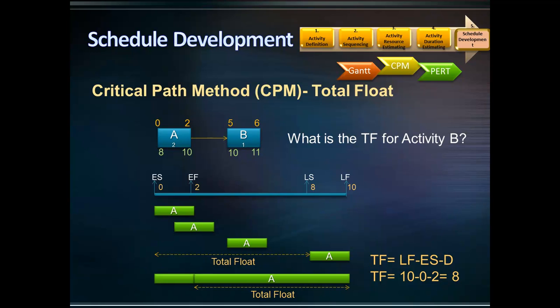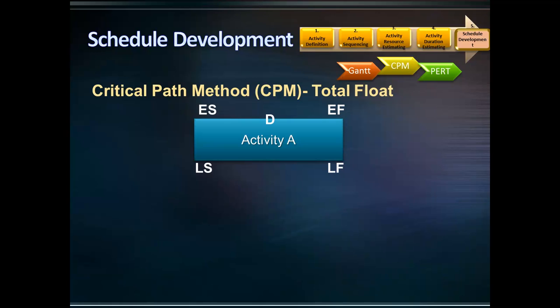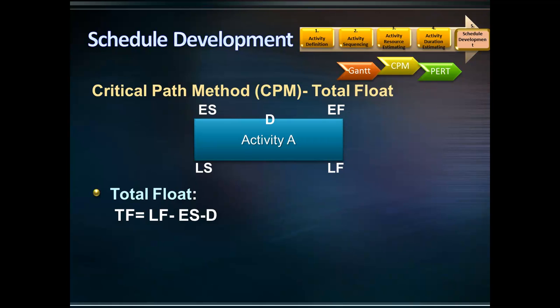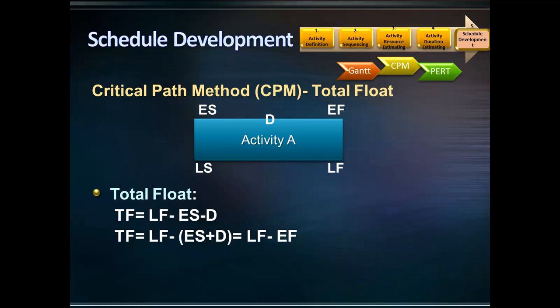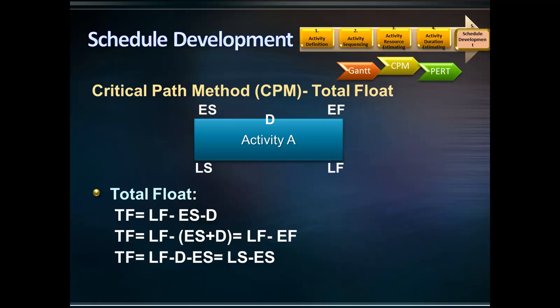The total float for activity B is 11 minus 5 minus 1, which equals 5 days. Let's further analyze the total float formula: total float equals late finish minus early start minus duration. Since early start plus duration equals early finish, another formula for total float is late finish minus early finish. Also, since late finish minus duration equals late start, another formula for total float is late start minus early start.